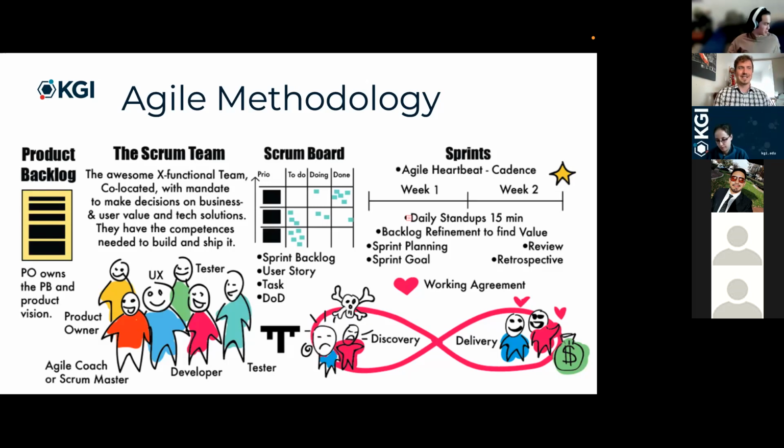And so it's essentially just aligning about what it means to complete something. Now, oftentimes the definition of done is actually, is this releasable to the customer? I won't be that strict with you all. I think definition of done would be something more along the lines of, does the function actually do something, right?